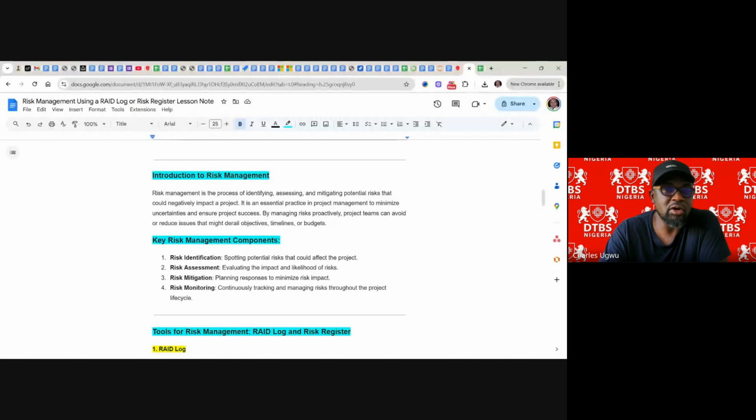That is what we call risk transfer. We transfer that risk to the insurance company. If anything happens, it's the insurance company. But in order to transfer any risk, we need to buy a premium. We have to be paying some amount of money because of that. But if the risk doesn't happen, the money is gone.